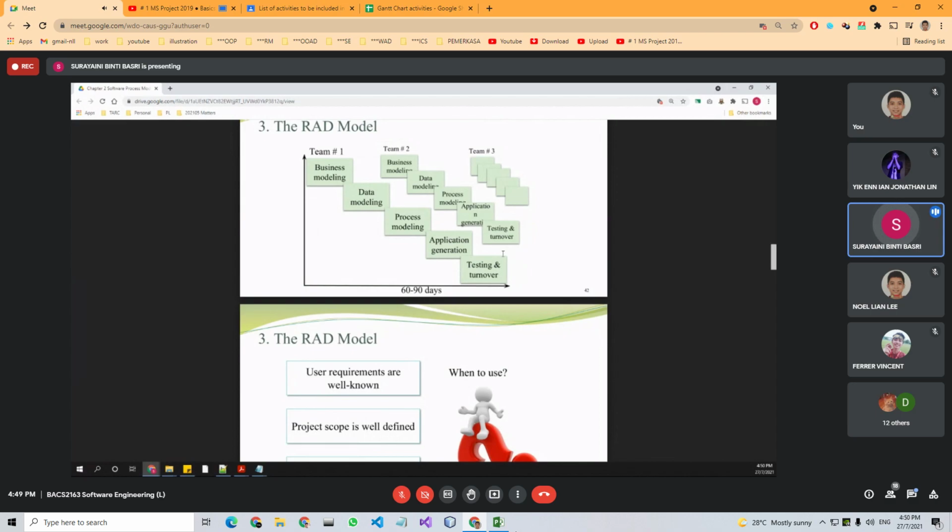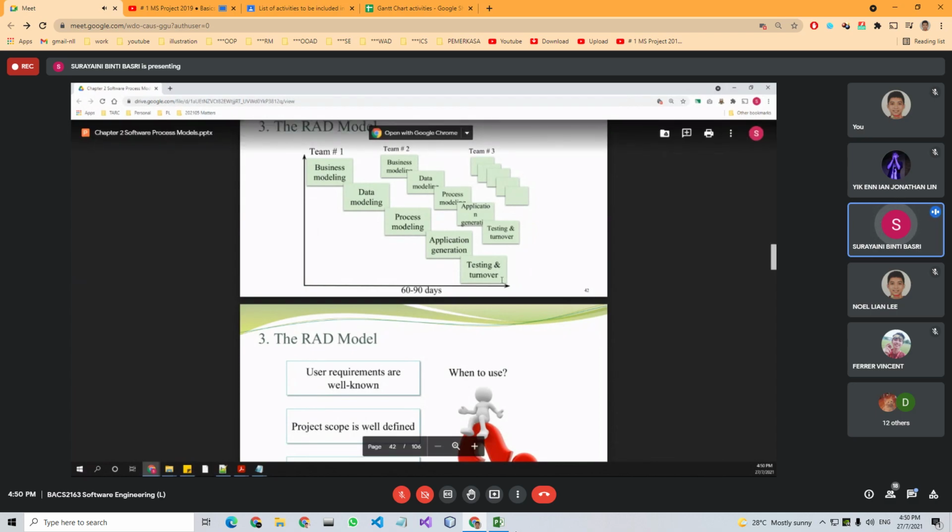Yes, each of the modules will have these phases under it. And after you finish all of the modules, there will be an additional phase, which is integration. Meaning you want to integrate all of the modules that were already developed. Yes, Kelvin, finally there will be integration. After that, then system deployment.